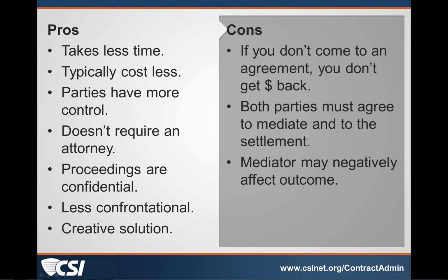Proceed forward with great communication and deliberation and voluminous documentation, so that you don't get caught trying to finance this process, but you also move quickly to find a replacement contractor. And I would expect your contract to require certain notifications of the contractor who has walked off the job. So I would just finish that by saying document it absolutely exactly like your contract requires, so that you don't overstep your bounds.